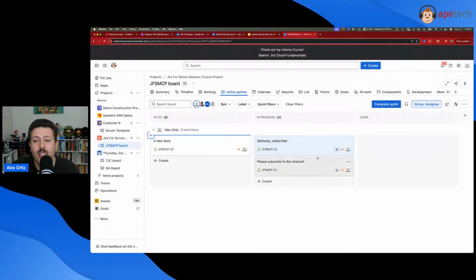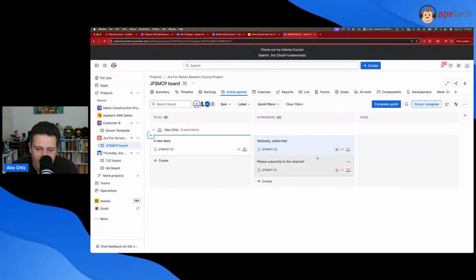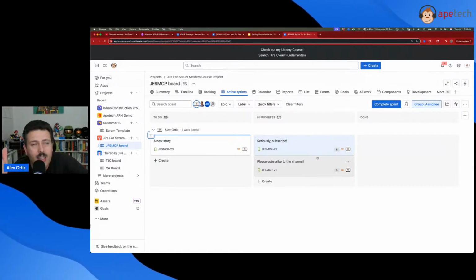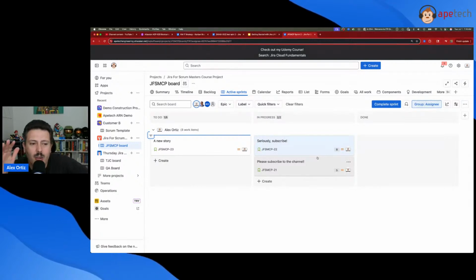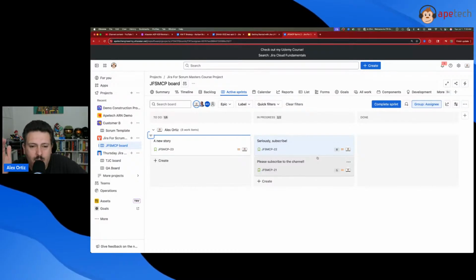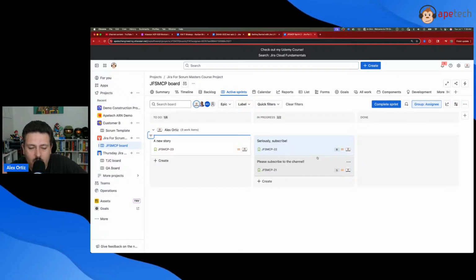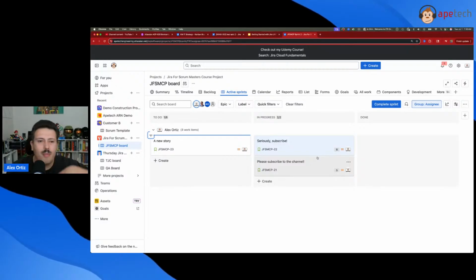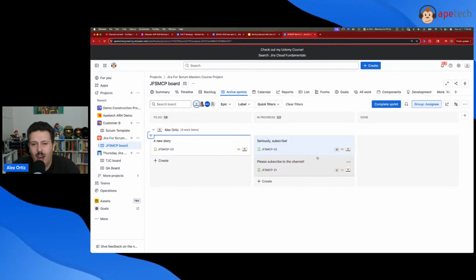As you can see here, Jira is being updated. And this, my friends, is the single most important thing about Jira. If you're not an admin, a scrum master, a product manager, or a project manager, if all you are is an individual contributor with things to do, then your one responsibility in Jira is to make sure you're updating your Jira tickets and your Jira status, because this is going to communicate everything else to the people that do care about the planning, the roadmaps, the progress, and your stakeholders.